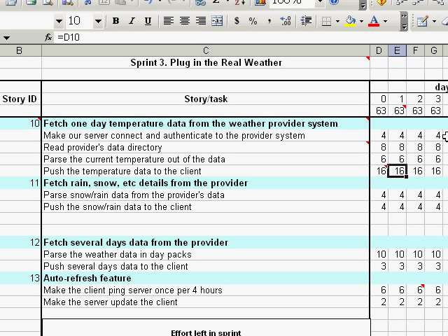If after estimating the effort needed, a team figures out that there is too much work, well, they can immediately turn to the product owner and ask him to remove some of the items or simplify one of the stories.